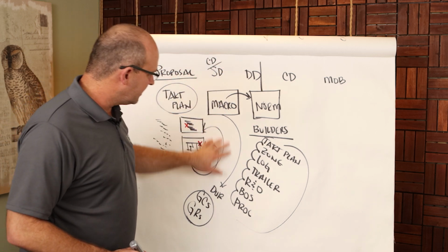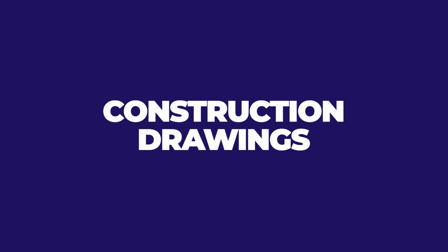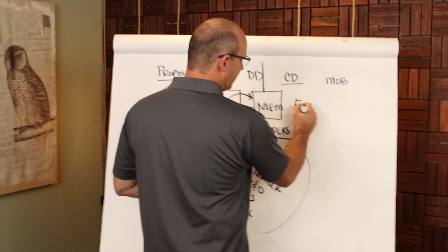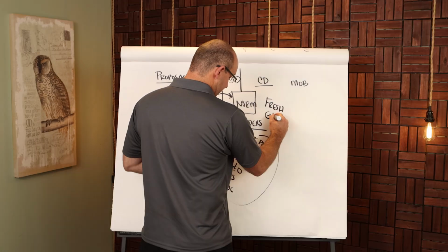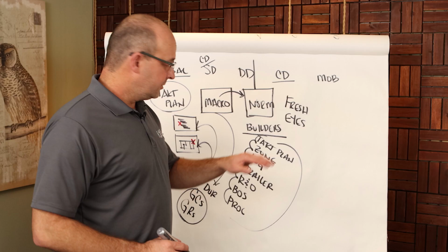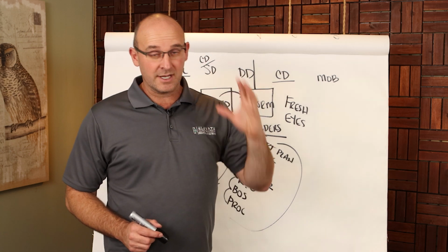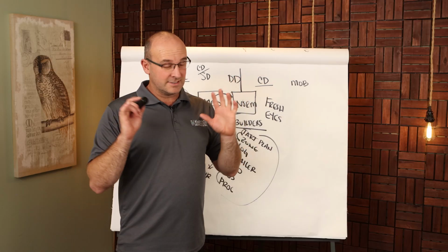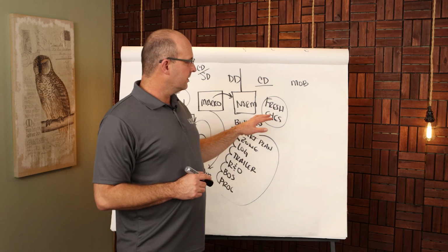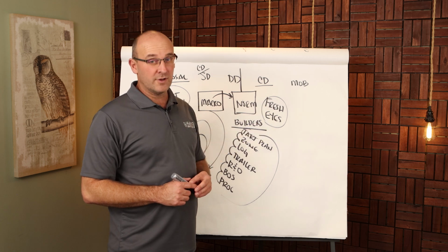So the purpose, so let me go back. Win the project, set the right duration, do the planning with the builders, and then in the CD phase, yes, you're updating all of these things. You're updating all of these deliverables. You're updating the plan. But here is where you're going to have your fresh eyes, okay? Fresh eyes means that you are going to pull in multiple experienced people to review this, tear it apart, find problems, basically smear your glasses with some kind of brown tint and look at everything as a possible risk. And in this fresh eyes meeting, you're going to tear it apart and literally build this thing and review it and simulate it on paper before you ever go out into the field.